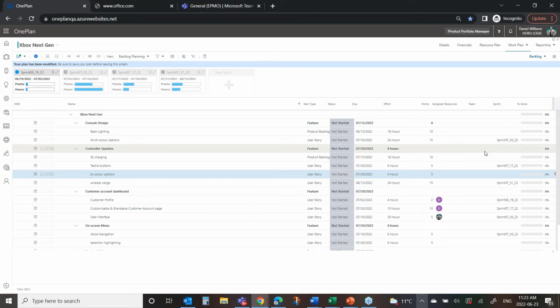And at the start of each release, I would revisit this and decide, has something come into play that we need to add or bump forward? Do we want to revisit our backlog, which is right here on the screen? And what is the next sprint we're going to do, or the 2 or 3 sprints we might do in a release? And where are we going to put these key user stories and product backlog items so that we advance the development of the product?